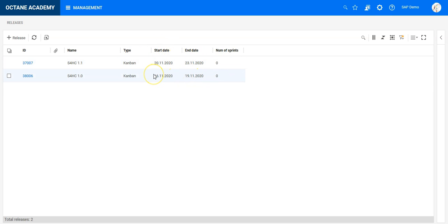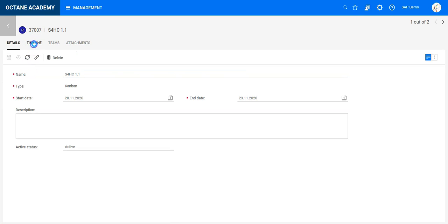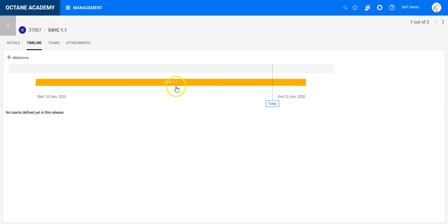This can be really based on weekly deployments you are doing, or you can have a big release with additional milestones, and these milestones will reflect your deployment whenever you are deploying towards your production environment. And for all your maintenance projects or upgrade projects, create a release and build a structure within the release on the timeline. So you really see where you currently stand and what's going on.